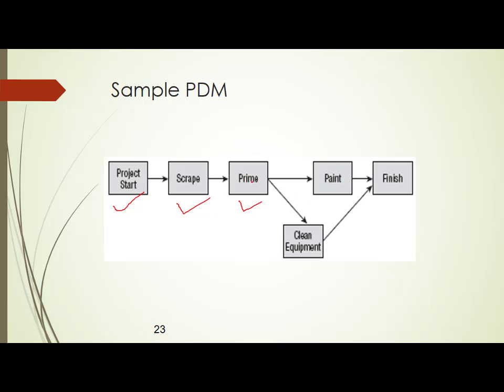Now here, after putting the primer, whether to go for a clean equipment and finish or whether to go for a paint and finish, this sequence of activities can be decided by expert judgment. Experts will tell you that after priming it is good if you clean the equipment and finish. Some people say no, don't worry. In our earlier projects we have seen that this cleaning equipment doesn't make much difference. So after priming you can directly go for painting and finish.